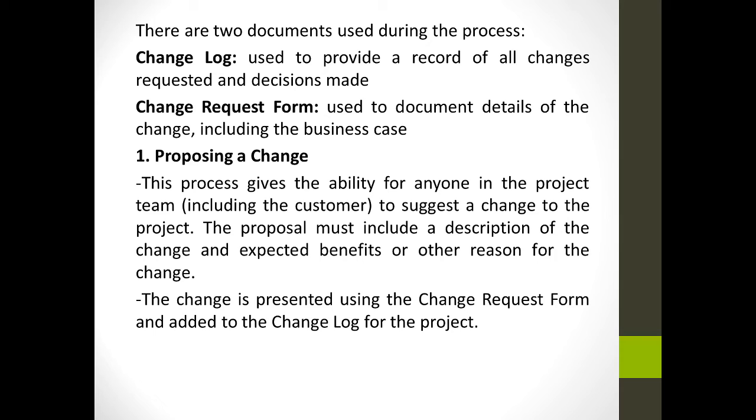There are two documents used during the process. Change log, used to provide a record of all changes requested and decisions made. Change request form, used to document details of the change, including the business case.